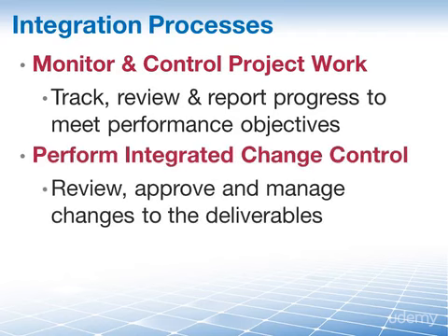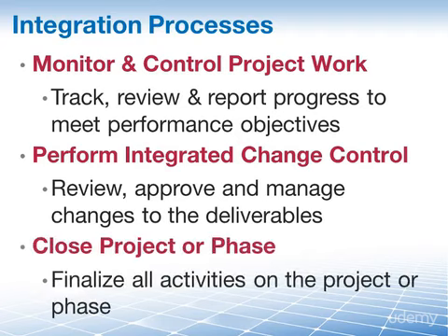And then we also have Perform Integrated Change Control. That's the process of reviewing all change requests, approving changes, and managing changes to deliverables, organizational process assets, project documents, and the project management plan, and also communicating their disposition. And at some point, we come to the end of our project and we want to close project or phase.